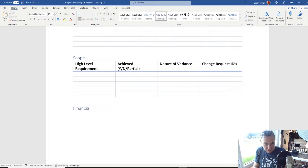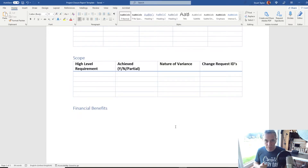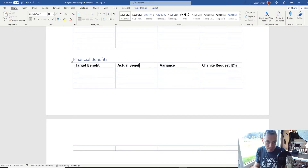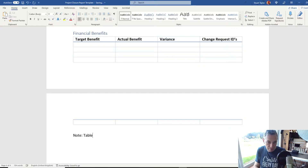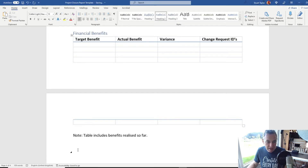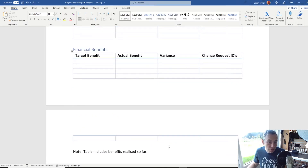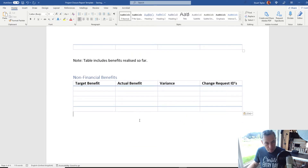Next, we're going to put a section for Financial Benefits. You've already had a section where you talked a little bit about benefits, but here we're going to break that down into a little more granular detail. Paste the table in from earlier and add 'Target Benefit' and 'Actual Benefit' columns — leave the Variance and the Change Requests. Underneath this one, put a note: 'Table includes benefits realised so far.' On the financial one, I did leave the totals row.